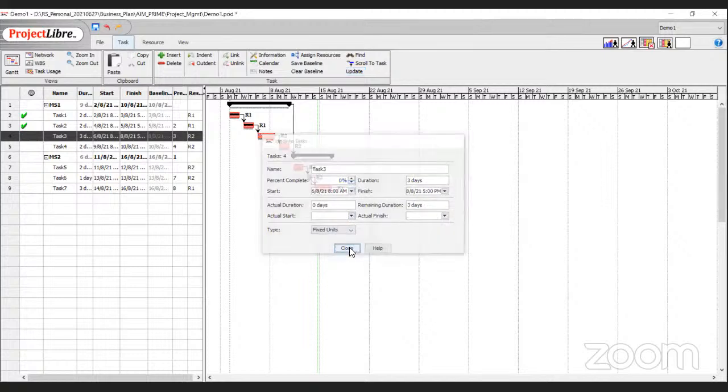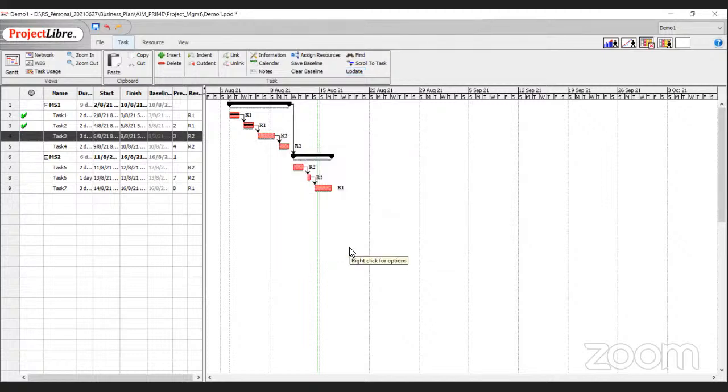Right. Now, as you can see, everything is in red. What does it mean? It means that every single activity is on the critical path because each task is linked by a dependency to the next task. Your project start date here was 2nd of August and the finish date is 16th of August, right? It has to finish by 16th of August if everything happens on time.